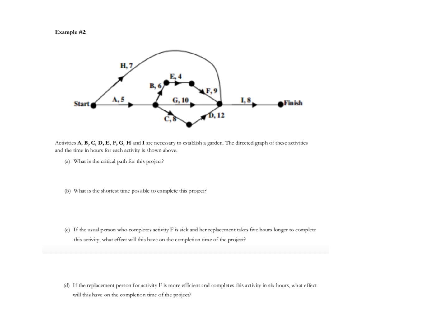So we're going to start it off. This is where I'm going to put the boxes and I'm going to say H and I'm going to say A. All right, so that's 0 and that's 0. Okay, so we do that. We get up here, and at this point we've actually got 3. We could go B, we could go G, or we could go C. So we all have to wait for A to happen. So that's 5, 5, and 5.